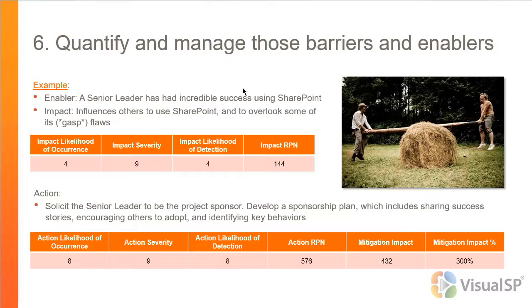And the actions that are listed here are things that you can convert into tasks on a work plan with timing and an assigned person. And so you can be really deliberate about moving the adoption along, rather than just saying, generally speaking, that this other person had a good experience and leaving it at that.